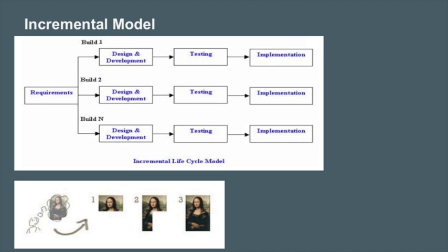When to use the incremental model? This model can be used when the requirements of the complete system are clearly defined and understood. Major requirements must be defined. However, some details can evolve with time. There is a need to get a product to the market early. A new technology is being used. Resources with needed skill set are not available. There are some high-risk features and goals.